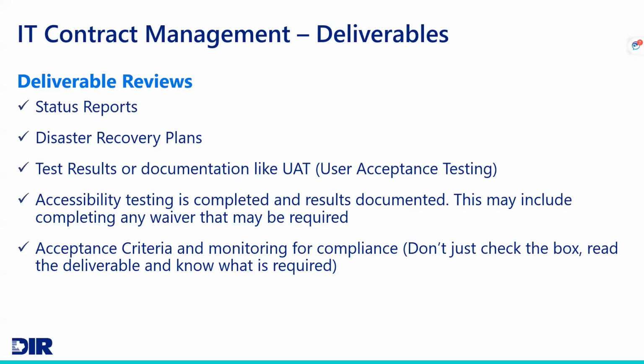Testing things like user acceptance testing. Is this doing what we need it to do? We talked about accessibility testing. Make sure that any of those requirements have been met or any waivers need to be signed. Also checking that acceptance criteria, make sure you monitor that for compliance. Even if you're taking delivery on computers, make sure that they're not broken or they haven't gotten wet, or if it's a service that you're performing, making sure that you're getting the service that you need.